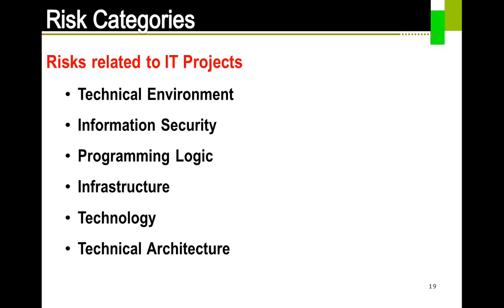And the technology itself can pose this risk. What I mean by this is, suppose you are using Java today, there is no guarantee that Java is going to be available for life, and somebody might find innovative ways to induce some bugs or viruses into Java coding. While this is one risk, there is also a probability that if for an organization all the systems are in Java, tomorrow one more beautiful language is going to come, and your organization may not even be ready to adapt to the new technology. Especially when I was a fresher, I used to always get this dilemma.